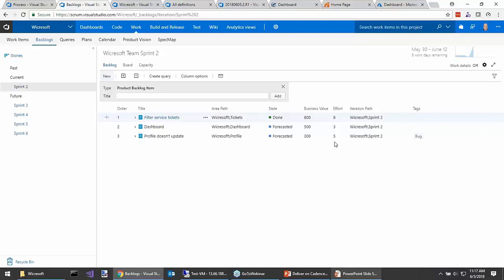They're the ones that know what they're capable of and what their schedule looks like. And they also know what the code looks like. So if they know that this dashboard item that the business wants is going to be in some really swampy, nasty, technical debt-ridden code, they might make that effort a little higher than a 3. But it just translates to more uncertainty, more risk as they're working in that area. So we've got the team here forecasting these 3 items.